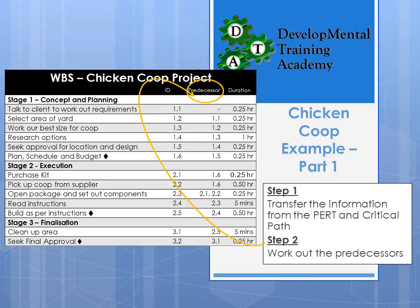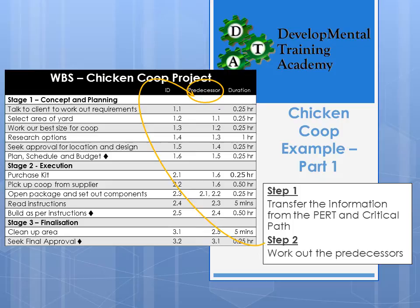To create a work breakdown structure for our chicken coop example, the first step is to transfer the information from the PERT and critical path. The information comes through onto our WBS with three stages: Stage One is concept and planning, Stage Two is execution, and Stage Three is the final clean-up. The first column has all our tasks listed, the second has the ID numbers, and the third is the predecessor. Predecessors weren't clearly identified in the PERT chart, but you can work them out by analysing those documents. Duration was also applied on the critical path.